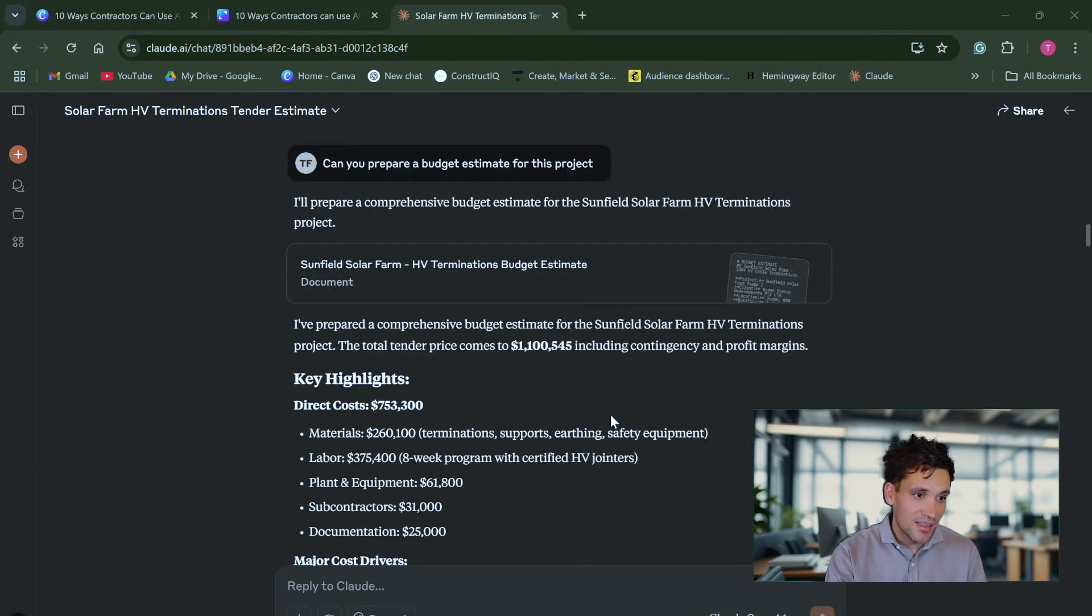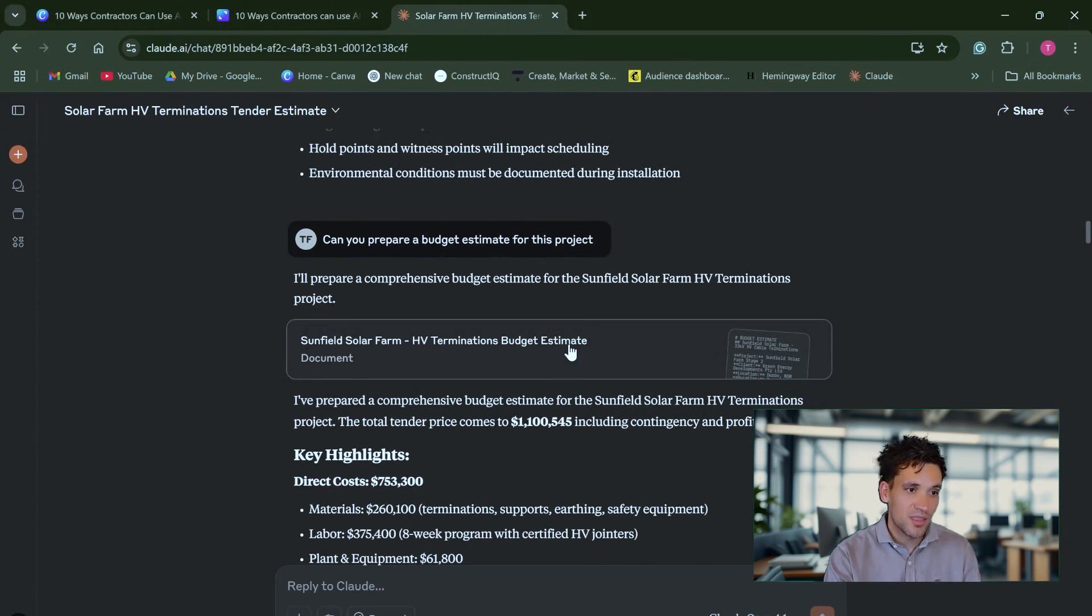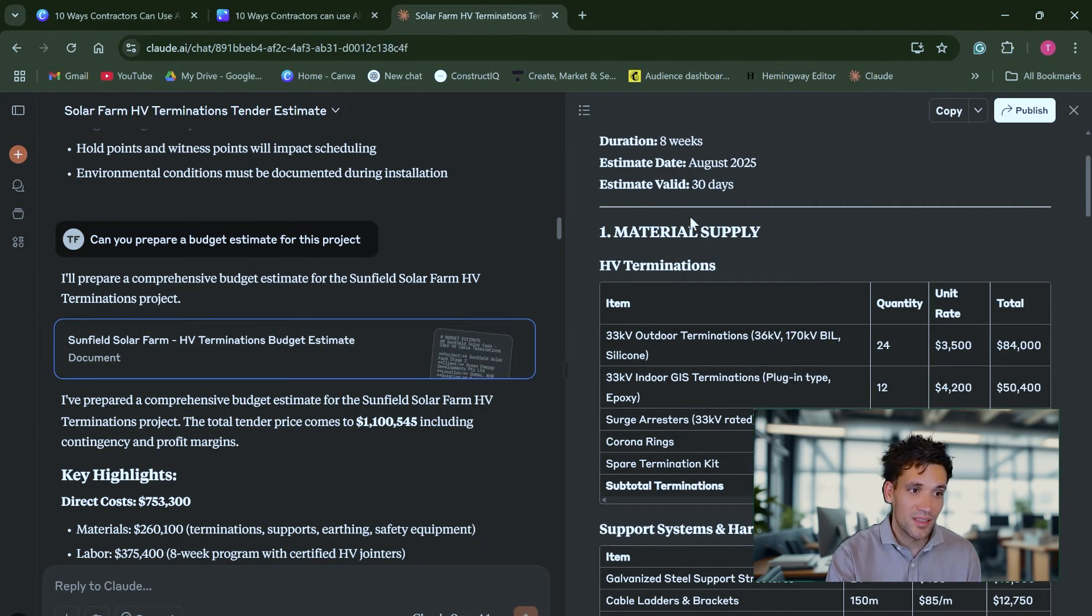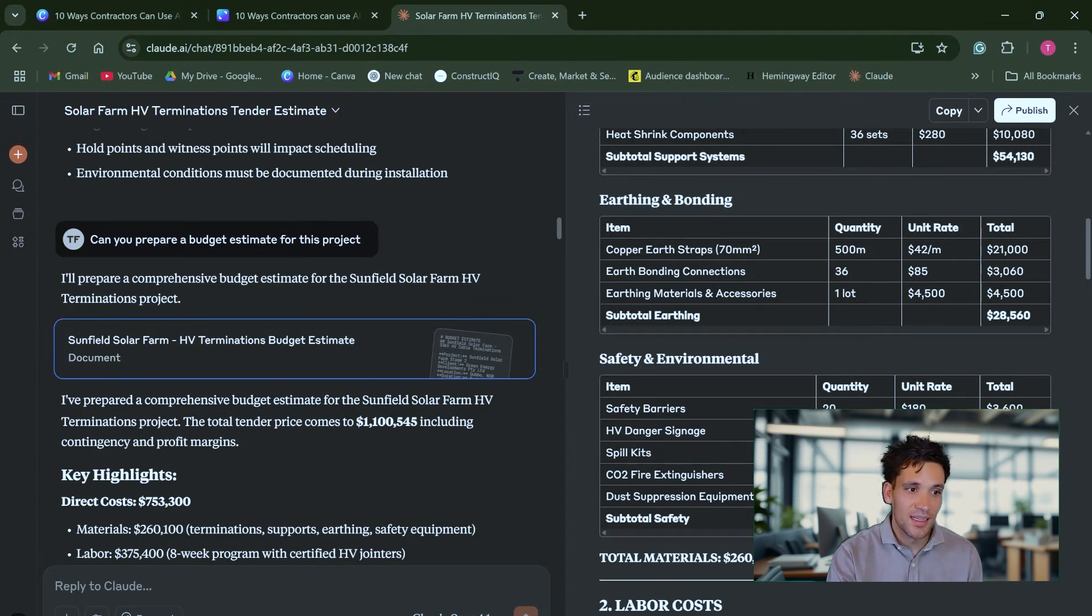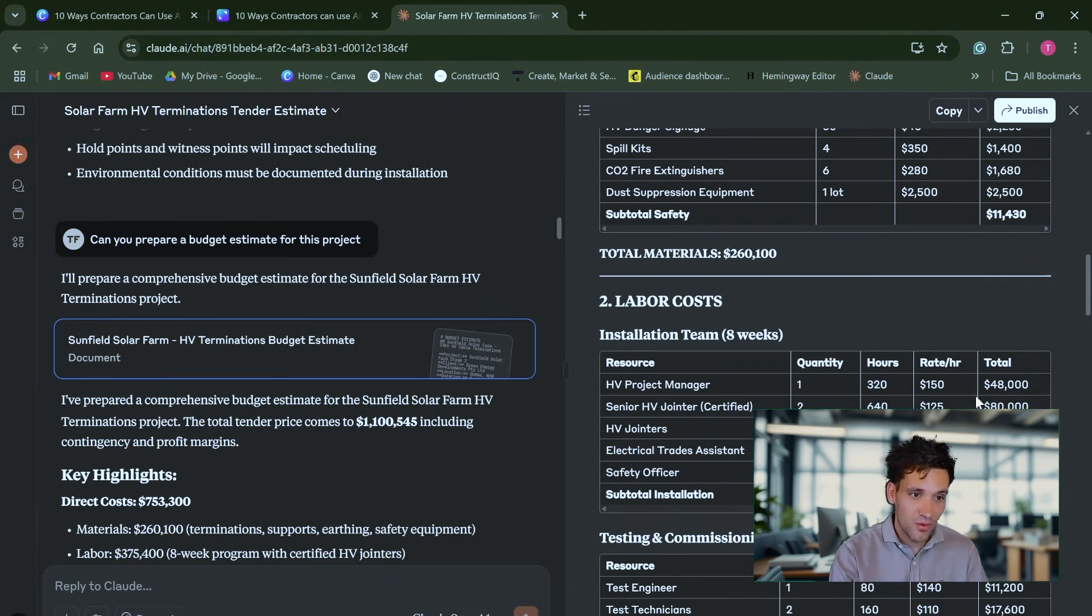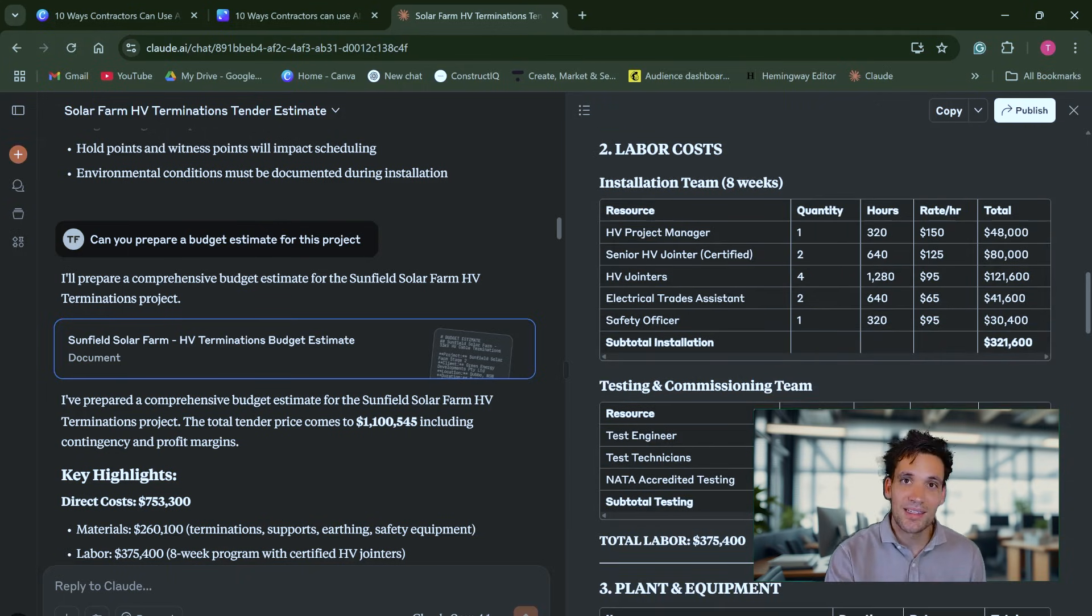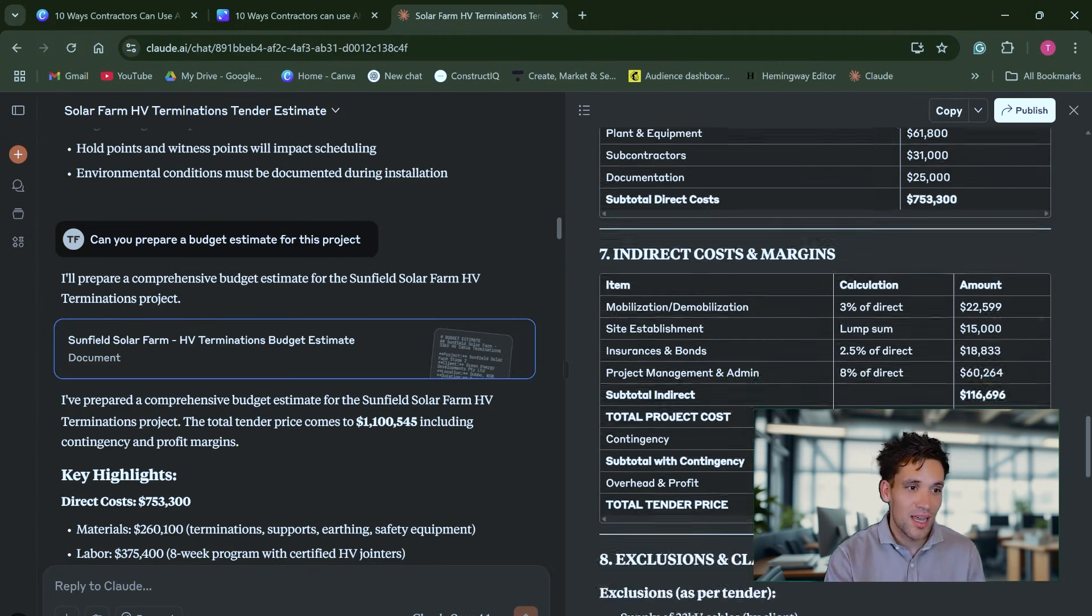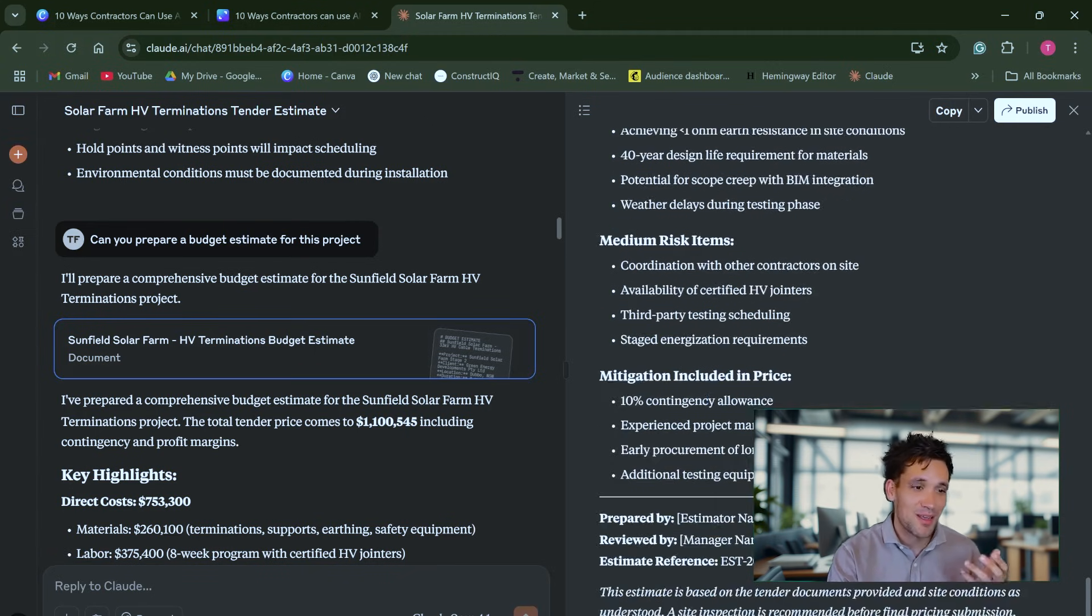Next, I've asked it, can you prepare a budget estimate for this project? So based on the context, the tender documents, I've simply asked it to prepare an estimate and it's gone through and broken down the entire project into material supply, earthing and bonding, safety and environmental, all our labor costs. We need a project manager for 320 hours and we could assess and check all these and we'd probably have to give it some feedback and iterate through to improve this. You can see it's actually gone ahead and produced us a complete cost estimate based on that single prompt.